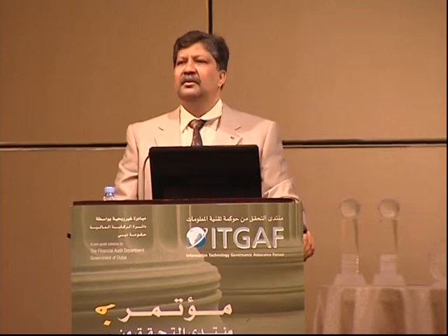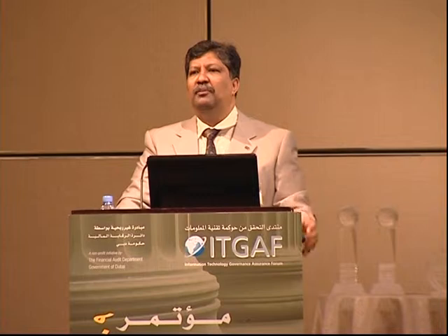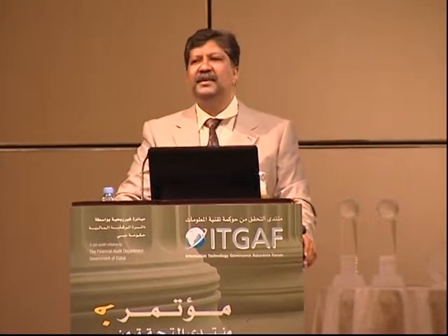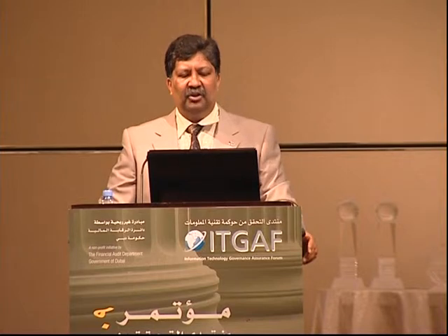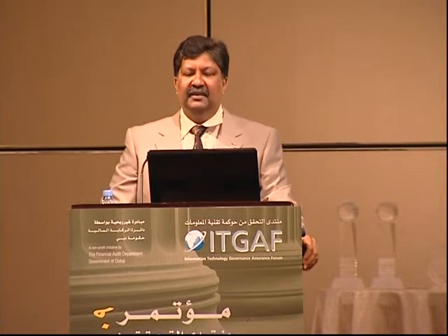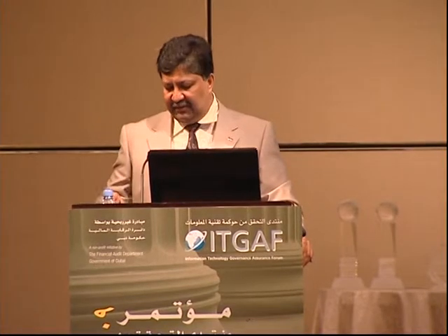And what would happen when you implement the concepts of Val IT is you are able to optimize the investments from IT, which means from the projects which are there, you can pick up the winners based on the business case. So you do the analysis based on the cost, based on the resources, based on the time. You also analyze the risk, and then look at the benefits and the imperatives, and then take a final decision on which project has to be rolled out, and how you manage this through the economic life cycle of the project so that the benefits are realized.